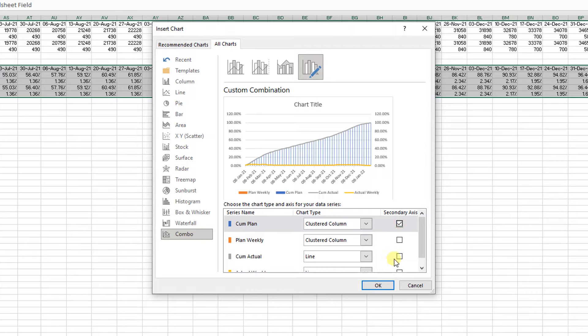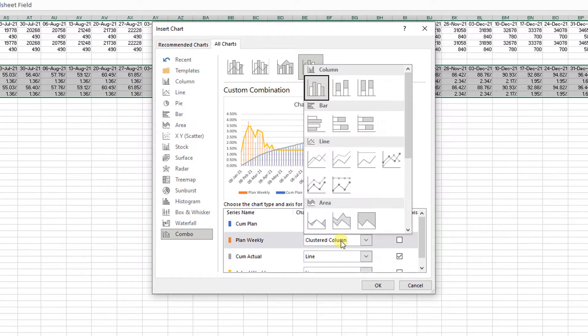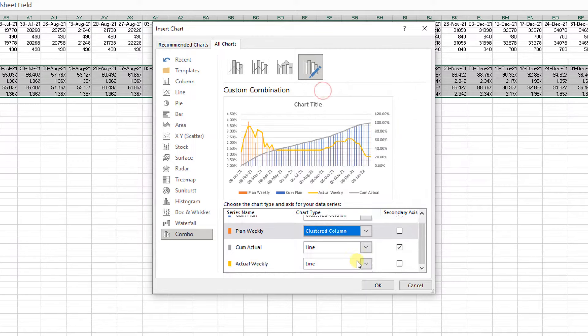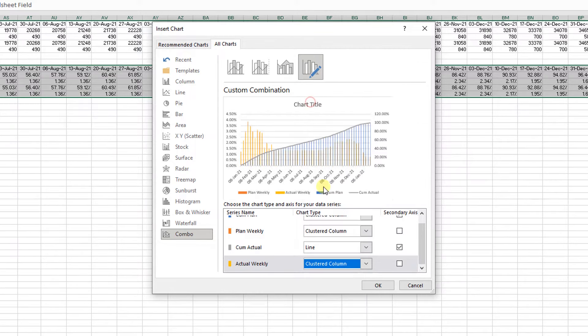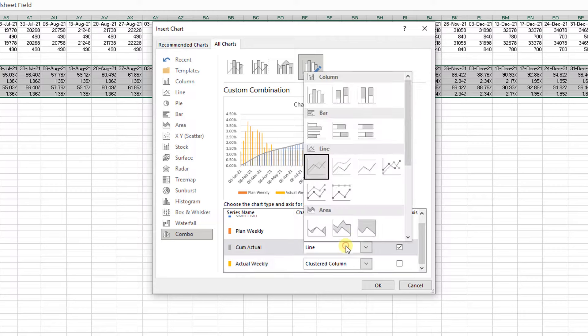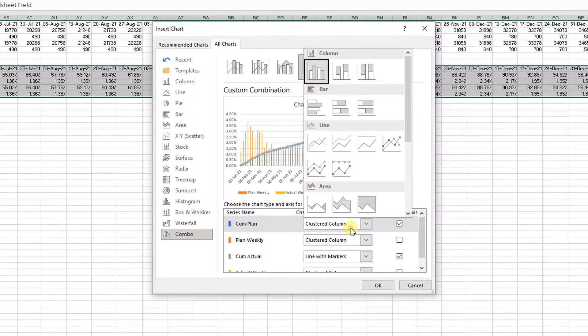Go to all charts, select the combo. It's a good idea if you change the secondary axis for cumulative data on the plan and actual. Now I want to change the plan weekly to the cluster column and change the cumulative data to the line with marker.